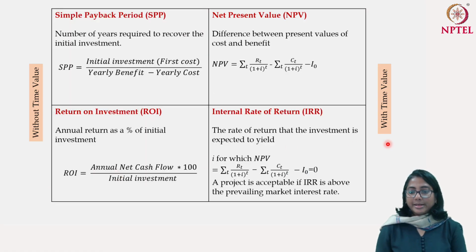Before we go to the internal rate of return, let us say one more thing about the net present value. You use net present value as a criterion to understand whether you should consider a project or not, and it is also used for the ranking of projects. So you can rank different options or projects based on their net present value. The higher the net present value of a project, the more lucrative it is, and it is more reliable to invest in that particular project.